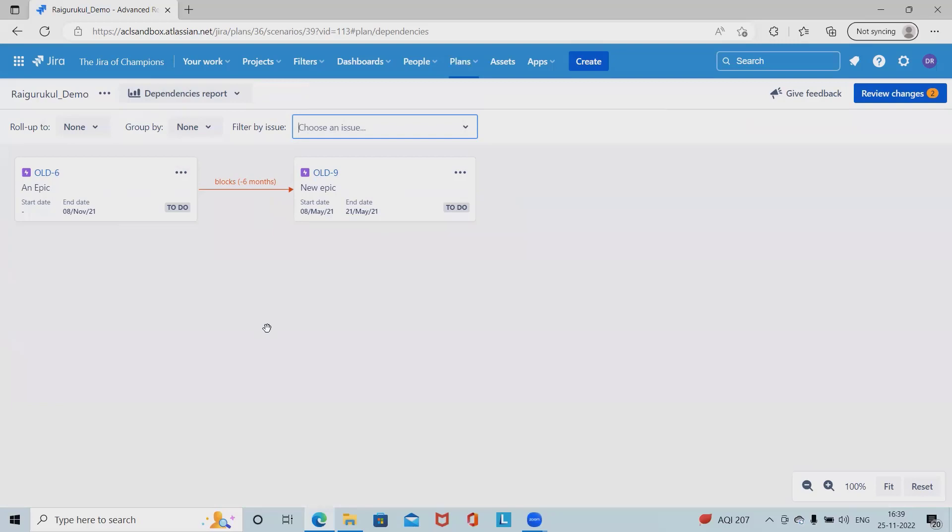Generally, by default dependency in advanced roadmap use the blocks issue links type. In order to use custom issue links in advanced roadmap plan, they must be created and defined in Jira, then added to advanced roadmap.